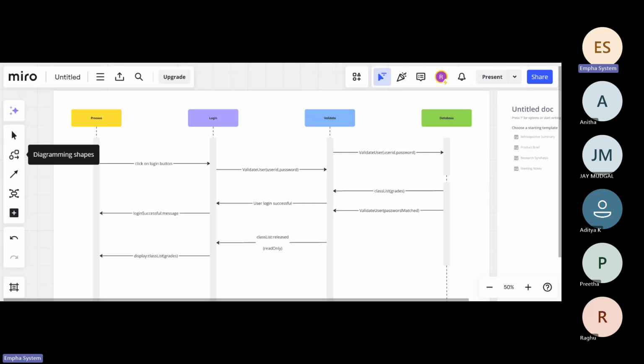But this is your responsibility. You should know what the scope of work is, what is out of scope, and to what level you will develop. You need to draw the line and inform the client: "Okay, till here we will develop, and beyond that we won't be able to develop because this is out of scope," though it is technically possible. Those kinds of reviews and analysis you need to have.